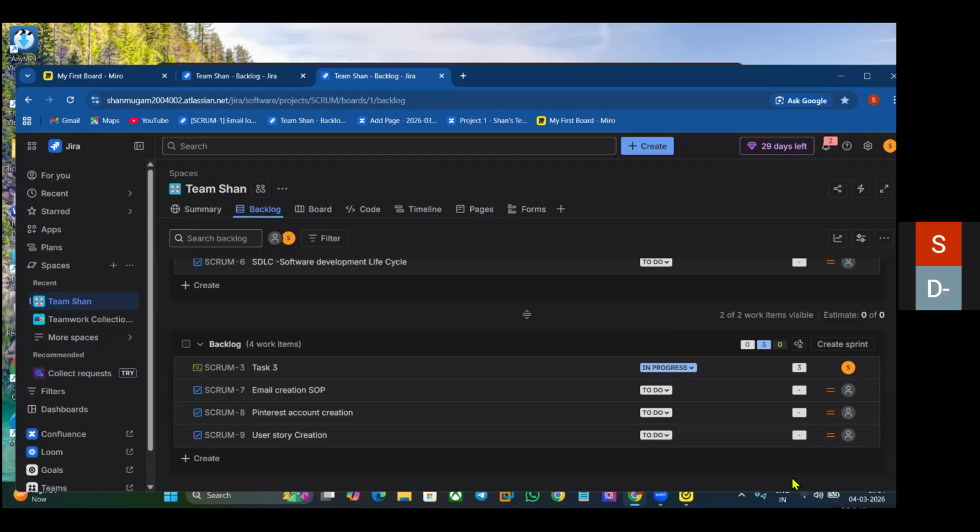Sometimes the team tells you, this is our assumption, this is our dependency, and whatever the outcome of the discussion is, you can add notes on the user story, or you can take the notes and edit if required. If the team is okay and they don't have any questions, you can ask for an estimation from the team, from developers and testers. Usually they estimate.